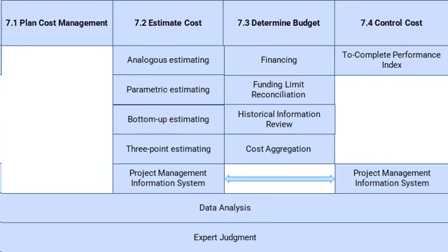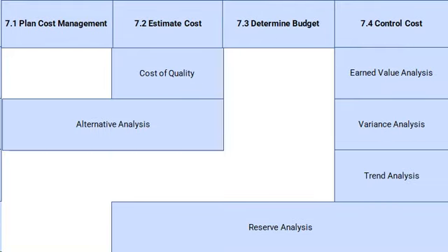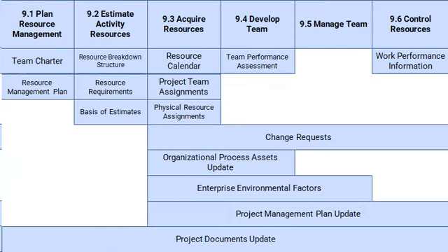This is because in some organizations, the cost is being checked by a committee or department where they are the basis if your budget will be approved or not. These cost baselines become relatively important, as any other unexpected expenses, in the most ideal scenarios, must not happen. However, if the scope increases, any changes to the budget may be brought up to the management, or the company itself may always add some leeway when it comes to increasing the budget based on their scenario response strategies and assessments. This may be the most likely solution so that you and the organization can reach a middle ground in terms of how expensive the project may be.